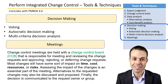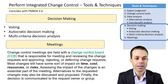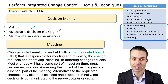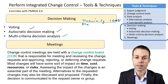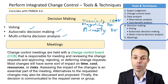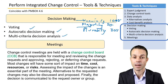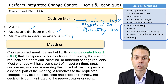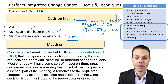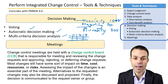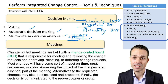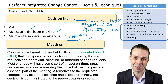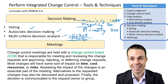To facilitate all of this, you will need decision-making techniques such as voting, autocratic decision-making, and multi-criteria decision analysis. With voting, you'll have unanimity where 100% of people agree, majority where you've got more than 50%, and plurality where you've got the largest block of people agreeing. Multi-criteria decision analysis is usually a matrix of different options to help you decide based on the benefits you'll get from a particular outcome. And of course, meetings — there will always be meetings as part of your project, and sometimes they're the fastest way to get the decision you need.